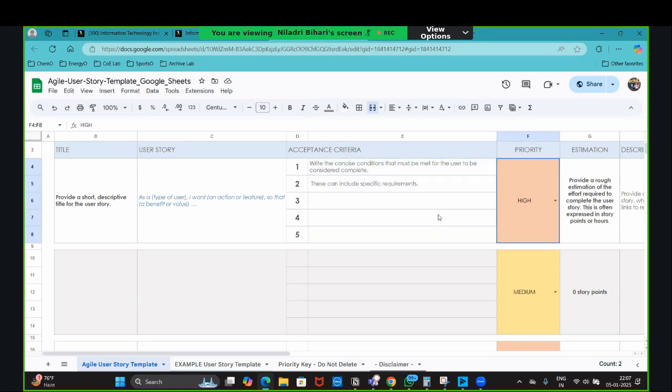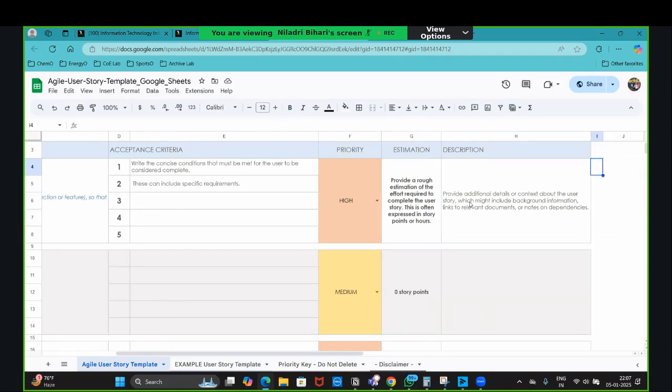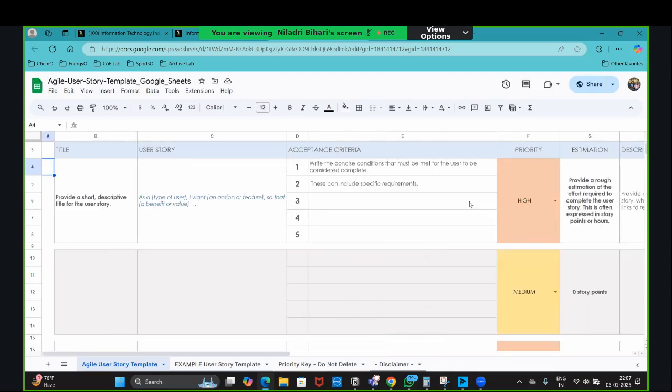And those priorities you can set up, and those estimations the client consultants will definitely be giving: whether it is possible, how much time it will take, or whether it is part of the standard implementation. If it is a custom portlet or custom implementation, definitely you have to quote your time and effort accordingly. So that is a kind of standard template. Actually, you can customize this template.